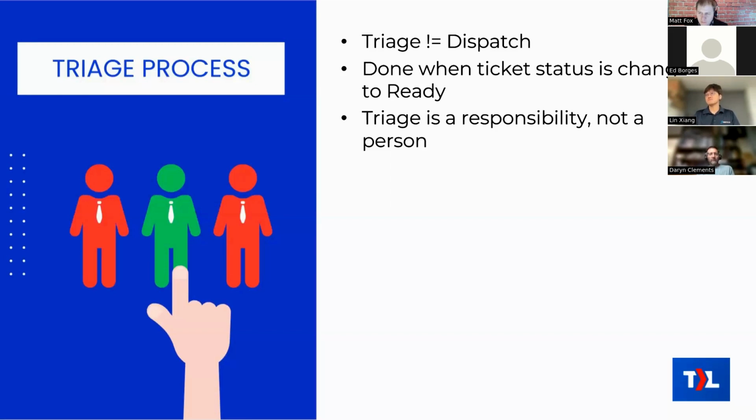One note about who actually does that. Triage, I would say, is a responsibility that you need to fulfill within your team, but it doesn't necessarily need to be a person. You can sometimes change who's doing the triage responsibility. Some people do it per week. There's somebody who's selected to be the triage person for that week. You could even rotate it by day. That's fine. It doesn't need to be a particular person.